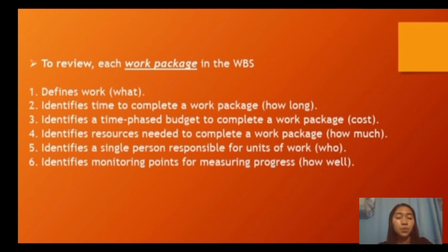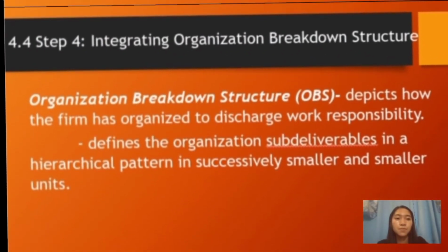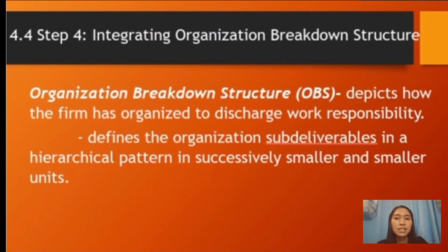Each work package in the work breakdown structure defines work. First, work pertains to what the project is. Second, how long does it take to complete the work package? Third, cost covers the budget and cost for the time bound. Fourth, how many resources will be needed to complete a work package? Fifth, who pertains to the people who have responsibility in doing the work? And lastly, how progressive the work was. And now, let's proceed to the fourth step, integrating the work breakdown structure.